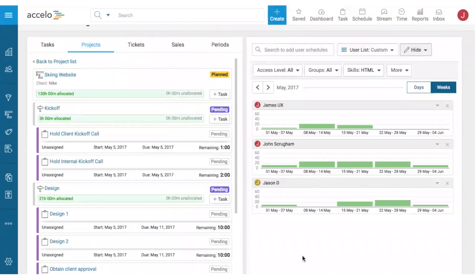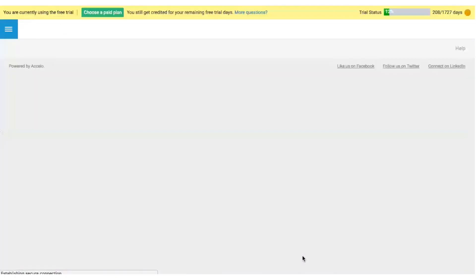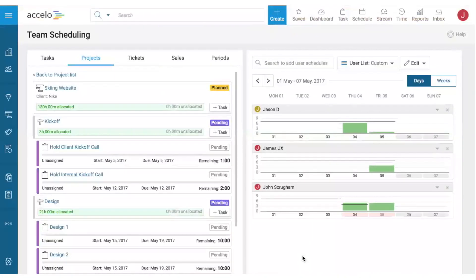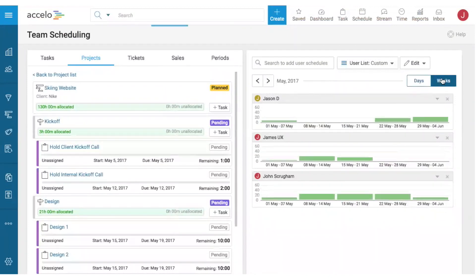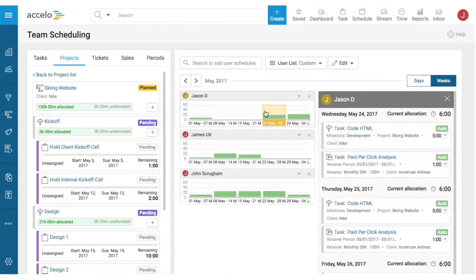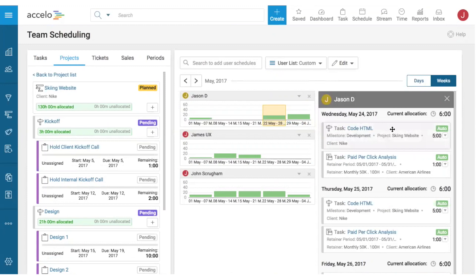When we return to the team schedule, because it's tightly integrated with the project plan, the project manager doesn't have to do anything. Jason's calendar is now completely free on May 15th without anyone having to adjust a spreadsheet. The task automatically appears starting May 24th with 'Coding HTML.' That's one way plans shift and how team utilization updates automatically.